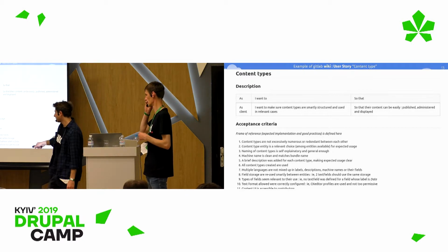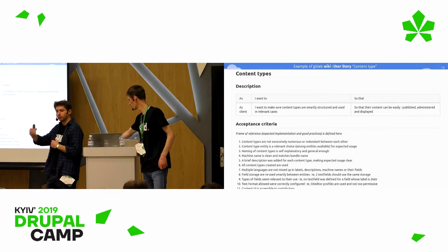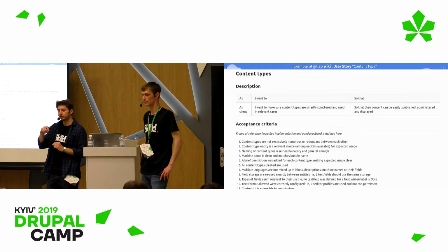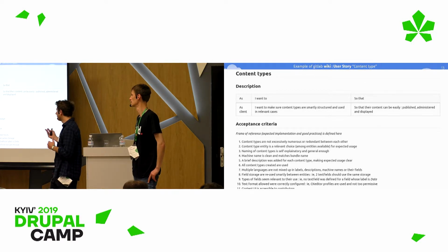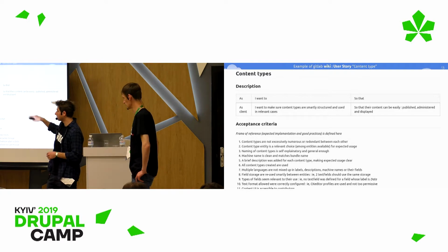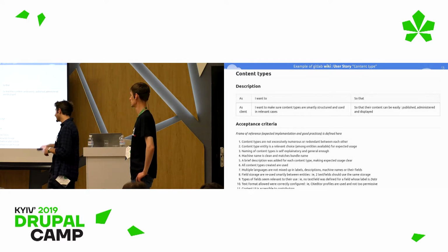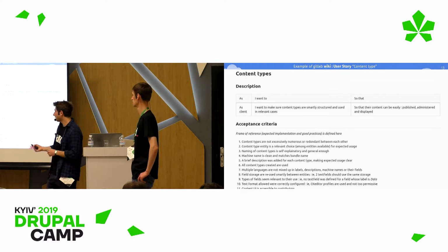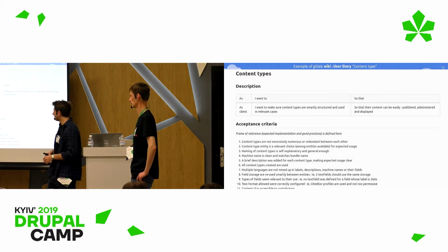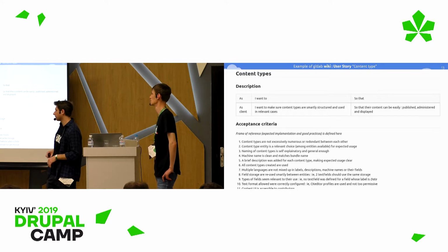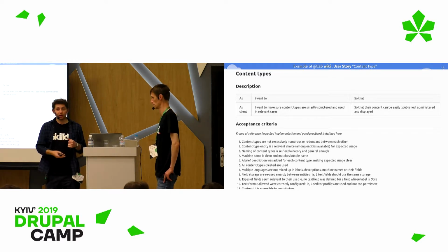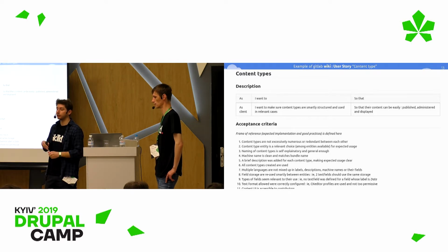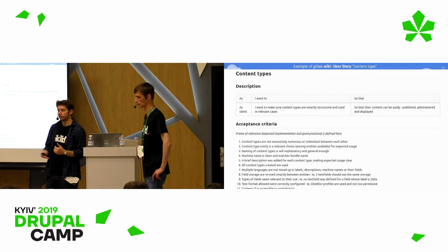And we wrote this kind of acceptance criteria list for every user story, every little topic that we could conduct the audit on. Because of that, when you create a task to perform on this topic, the developer knows exactly what he has to look at during the audit. And because of that, you can give the task to junior developers, and it's really straightforward. And we try to build this list of acceptance criteria with Alexey, and we will iterate on it based on the audits that we do and what we will have.